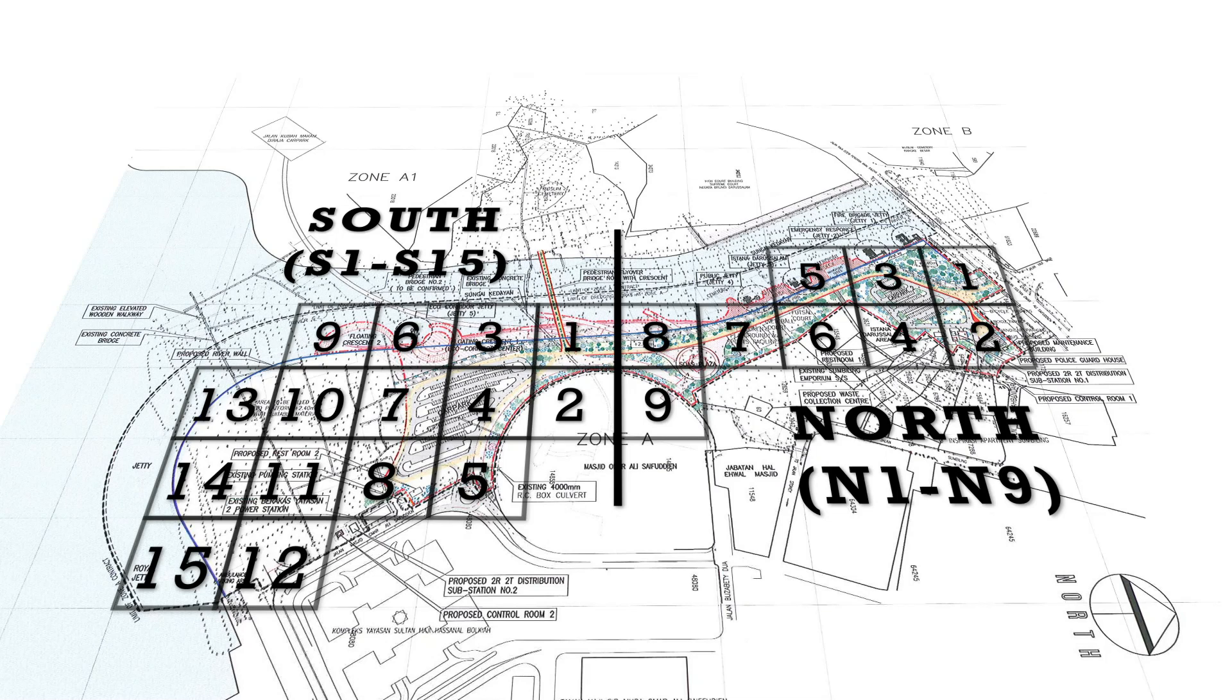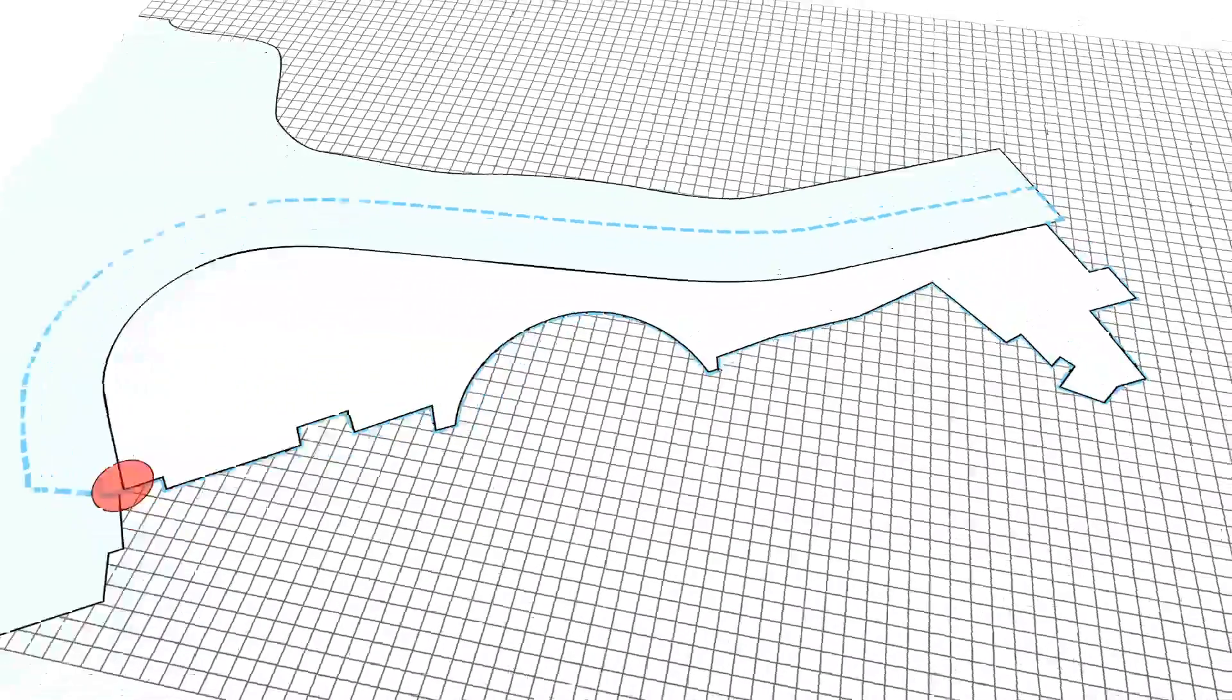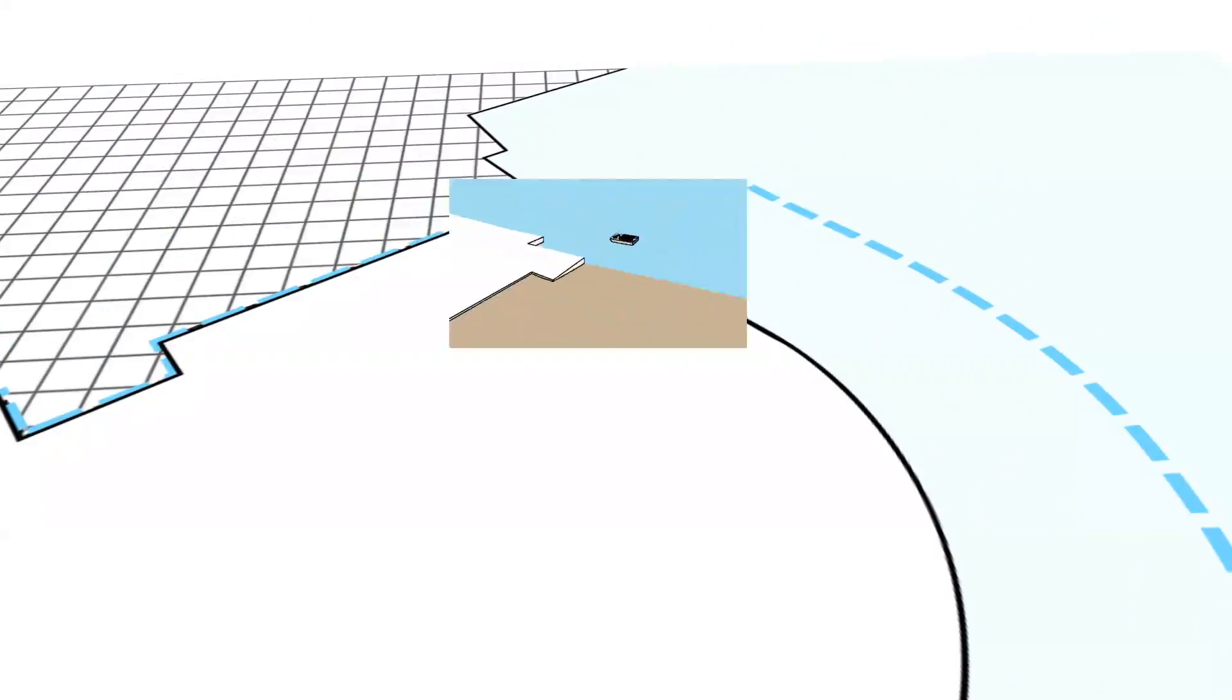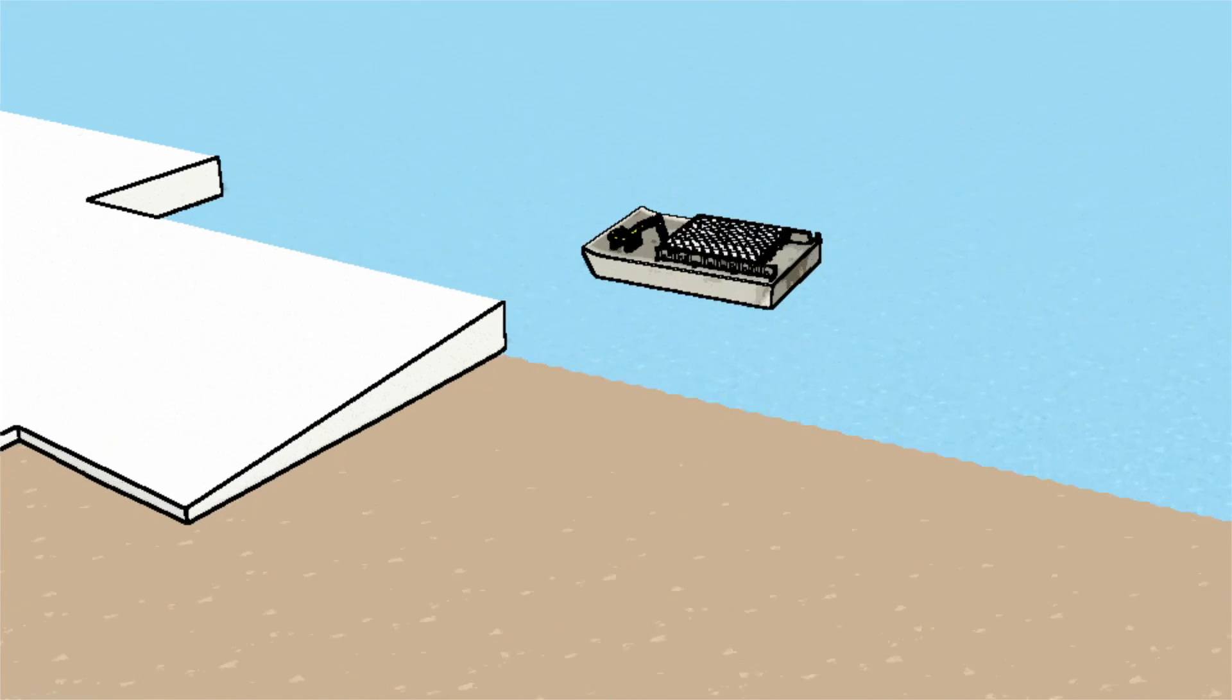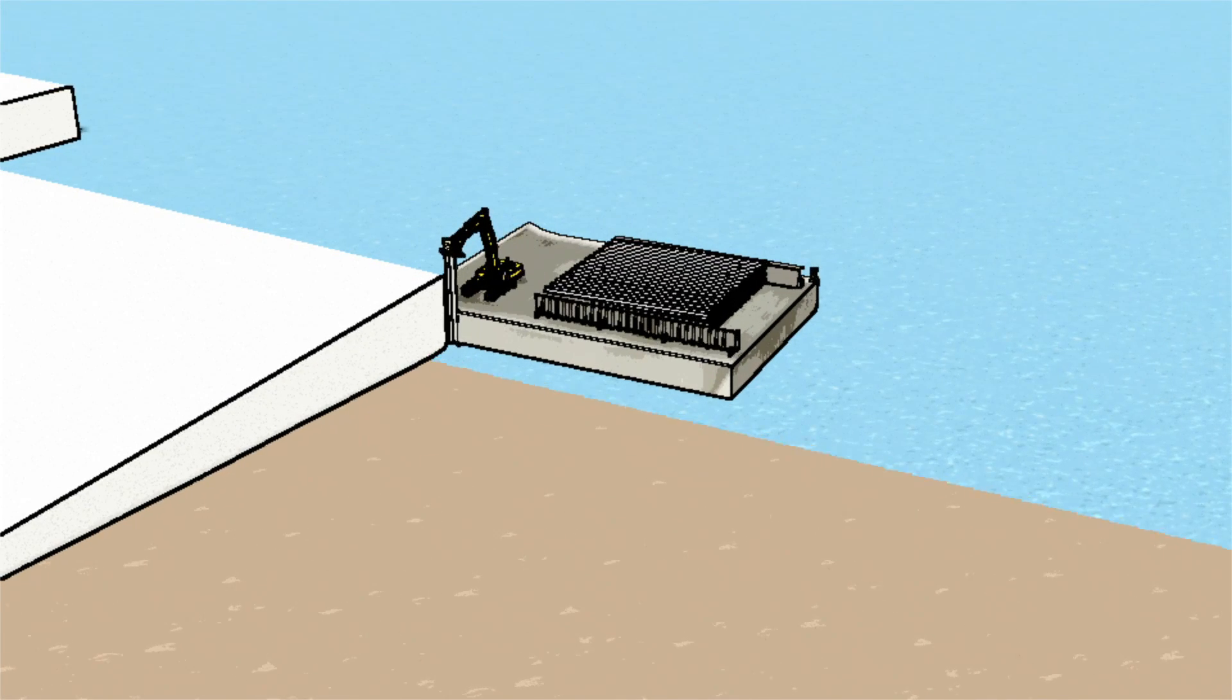Works will start simultaneously at both South and North areas, and these are temporary works so that permanent works can be carried out. In the South Area, metal sheet piles will be installed as protection to the bund construction, which will act as a working platform for piling works and also as a subdividing barrier for backfilling works.